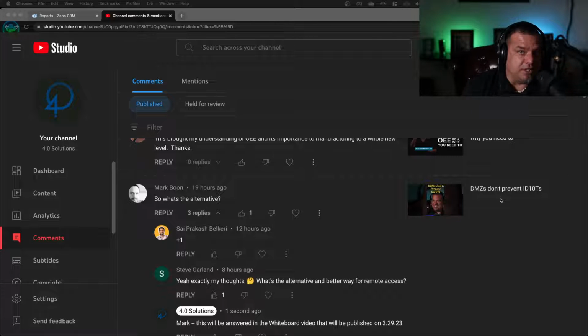Well, first off, anybody who's done any type of work like that knows that it's incredibly inefficient. If you were to talk to executives, I can tell you in my company, for example, when we see a client who's using a DMZ, there's a huge amount of contingency that gets put into the billable rate. So let's say I've got access to the plant floor through a DMZ, and we think a specific task is going to take 160 hours. That's easily going to be doubled simply because of the DMZ access. So now you're looking at 320 hours. Literally, what it does is it splits your velocity in half.